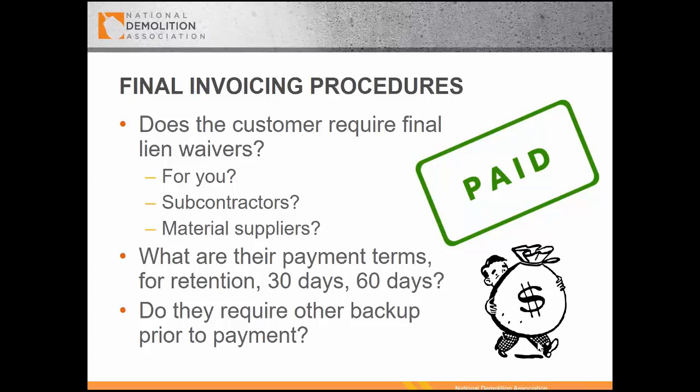And then understanding what the payment terms are going into a project. Is the client paying 30 days, 60 days? Do they offer a discount? If they offer you an opportunity to provide a discount, sometimes it's as low as 0.5% or 1% to get paid in 10 or 20 days. Again, cash is king. That may be something that you want to avail yourself of. And then what other type of backup do they require? Understand that going into the project so that you can get paid. Next slide.